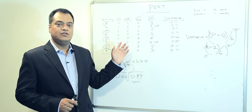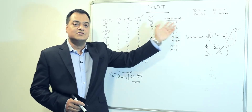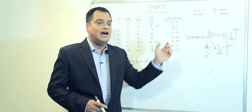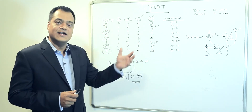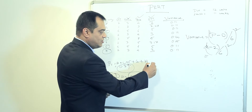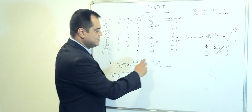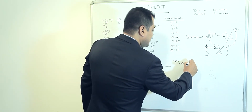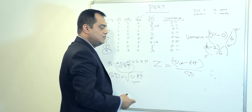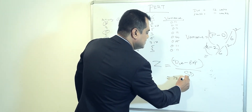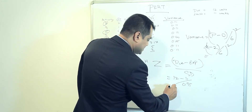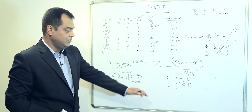The whole idea of PERT is to find the probability of our expected value. The due date is 12 weeks and we expect to deliver in 11 weeks. To find the probability, we calculate the Z value from the normal distribution table: Z equals due date minus expected date, divided by standard deviation. That gives us 12 minus 11 divided by 0.95, which equals approximately 1.06.